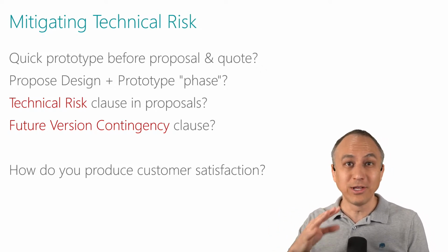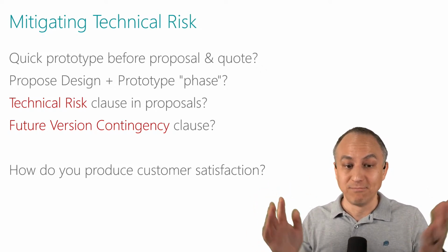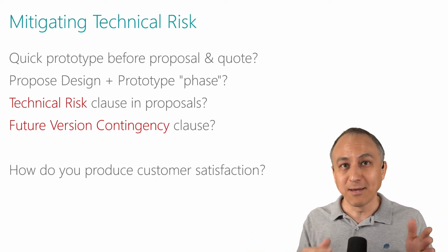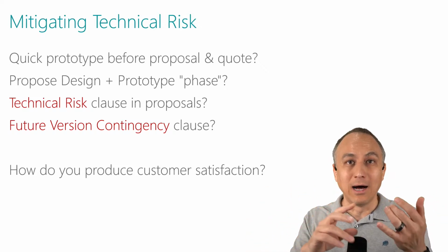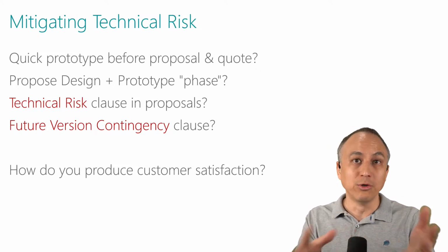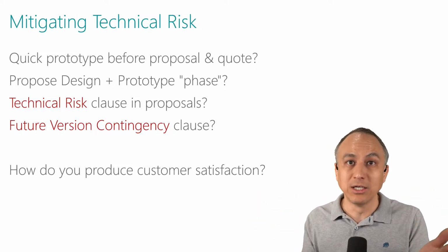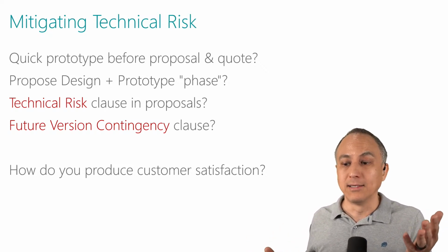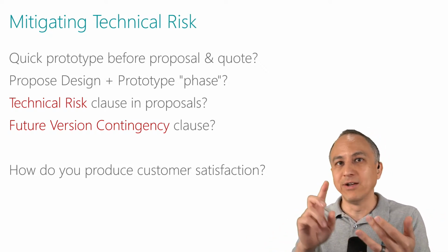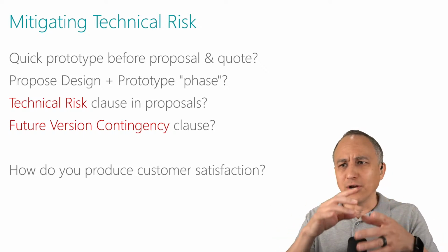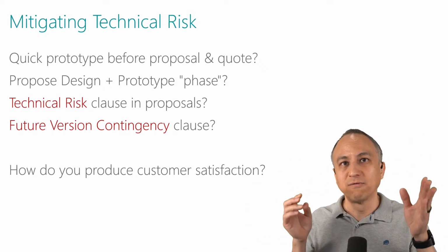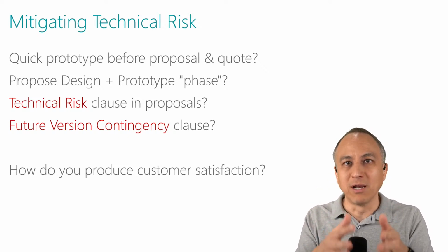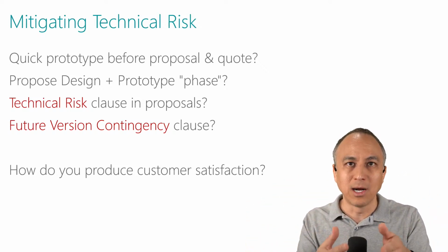This particular scenario that I've been describing, I'm producing it before I even propose. I'm saying, look, yes, it's taken me 3 weeks to get here, but I'm not going to deliver the solution you asked for. I'm just not going to do it because I cannot guarantee that it'll even work. And even if we do a custom API, even if we do this, even if we do that, I'm seeing all these other risk factors for what should be a very simple project. And I don't think it makes sense to spend 40 hours on a 10-hour project.